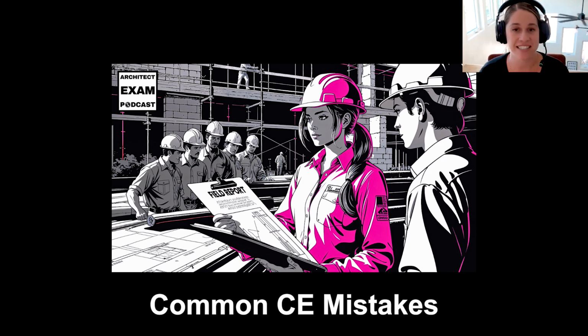So documentation is taking good photos, marking the date that you were there, the weather you were there in a field report, and compiling all that information and keeping it really organized and keeping good records of a job site visit. It's not very exciting work, but it's very needed. Maybe during site visits, it doesn't seem that exciting to keep track of everything, but later on down the road, if something does go wrong, you will want those records to back you up on any changes that were made or any conversations that were had.